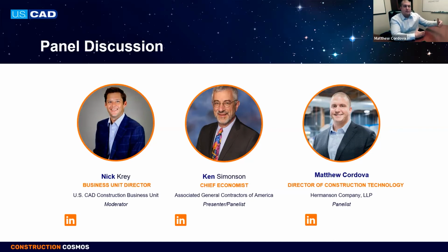We're set to be on site and installing at a specific time. So getting through some of the technology portion a little bit early, if you're going through BIM coordination or anything like that, is paramount. The sooner we can get through that, the sooner we can order material and plan staging. If you can get through bulk orders to prep for a larger project, that's a decent way to attack that.